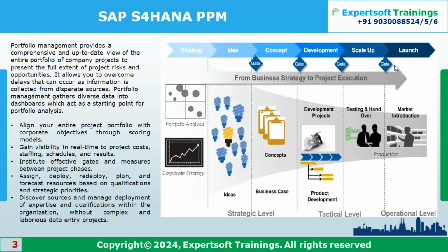Also, you can do your resource planning. So how many resources you want to deploy against each and every phase of the project. Maybe in this phase you have some people you want to deploy, so before that you want to plan. That is all role based. How many people, maybe Java level 1, level 2, level 3, or maybe a SAP person, you need some other role based. So those roles you're going to deploy, and the system will automatically calculate that cost.